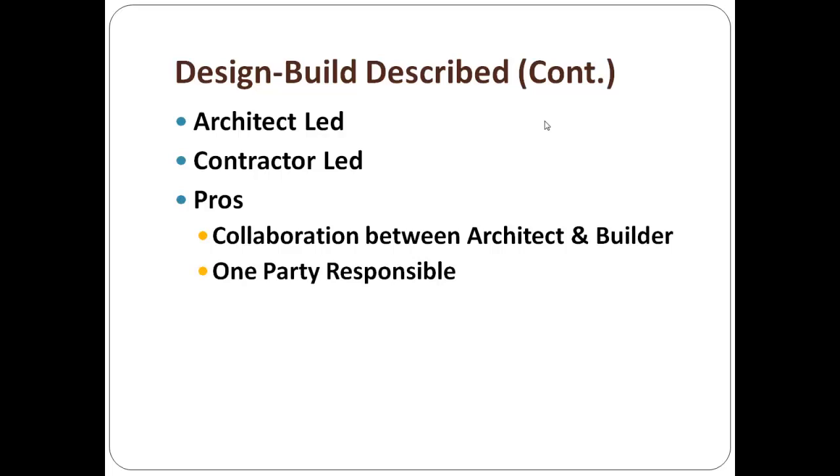One party is responsible. It solves the squabbling or the conflict, the arguing between the builder and the architect, because they're the same company. They have to solve their own problems in-house. So it takes that burden off the church. You have one person responsible. They designed it, built it. If it's not right, they got to fix it. So that's the advantage to this.